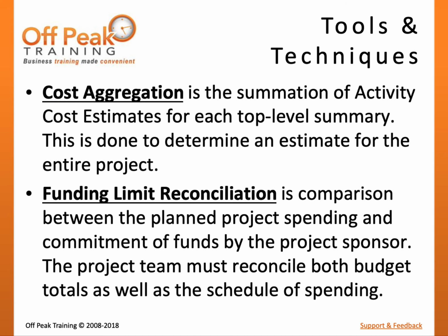There are two key tools and techniques for the Determine Budget process. Cost aggregation is simply taking all of the individual activity cost estimates and adding them together for each top-level summary. This is done to determine an overall cost estimate for the entire project.